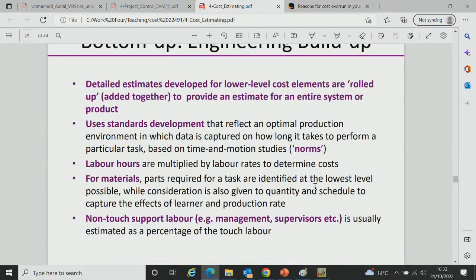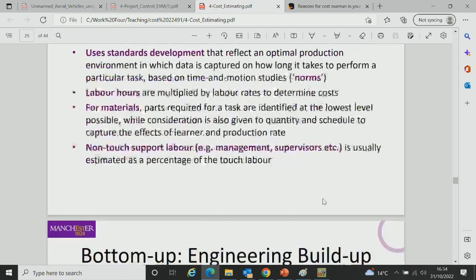Or you've got the ground up, the detailed estimate. Now the thing is, with a detailed estimate, you can be very specific about the hours, but you can get these small errors aggregating through all this fine detail. Hopefully they balance out, but if not, they can aggregate. People have to build these things on spreadsheets, and they make mistakes. There are so many numbers and calculations that they can make silly errors that might get past the audit process. So it is possible.